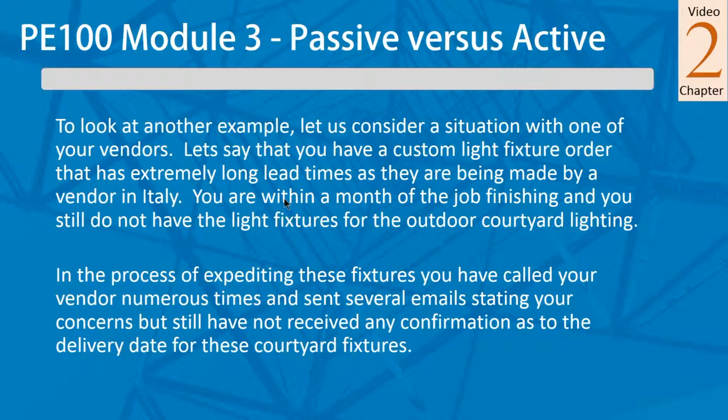Well, now, did he answer your question? No, he didn't say anything. He's passively telling you that somebody else is telling him this. So when you go to the general contractor and say, yeah, I'm going to have these switchboards on time, you don't know if you really are or not. You have somebody telling you that he talked to somebody else, so you have nothing that gives you any indication that it's really going to happen.